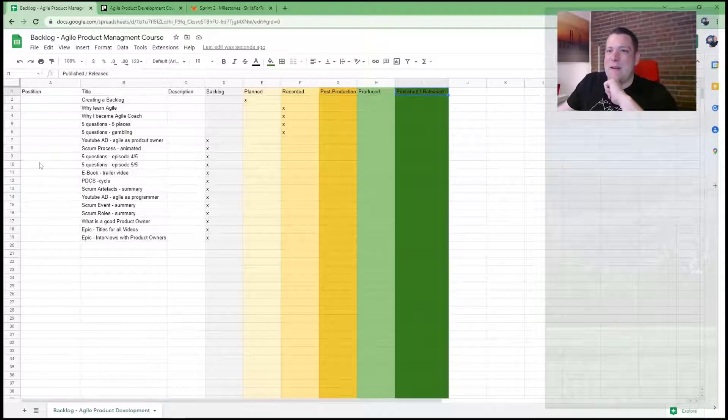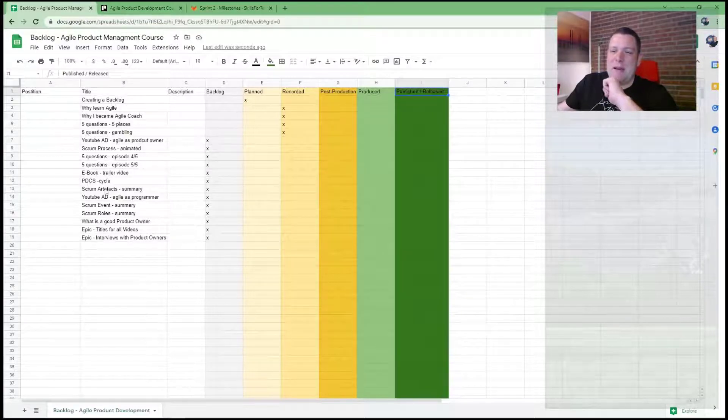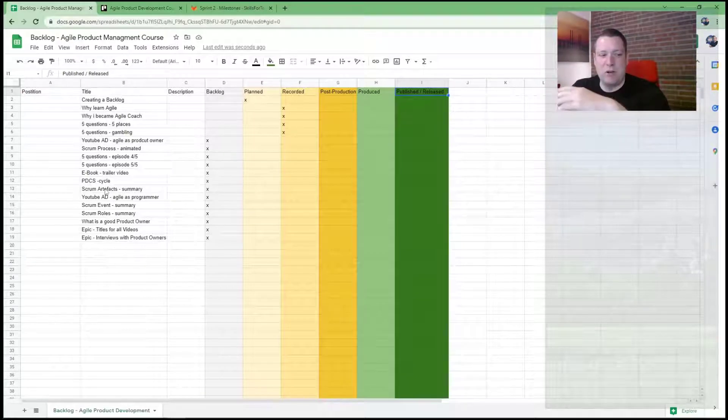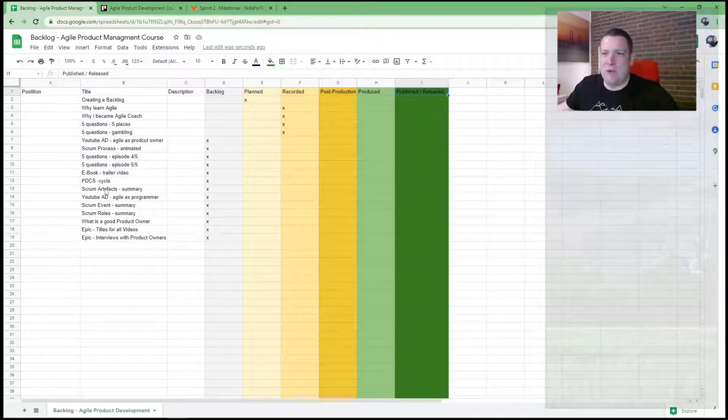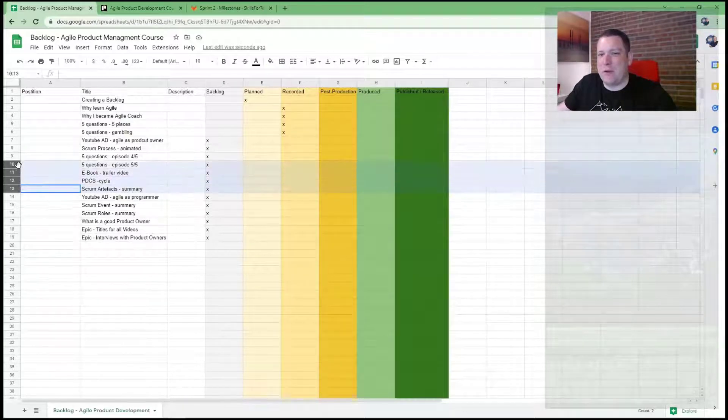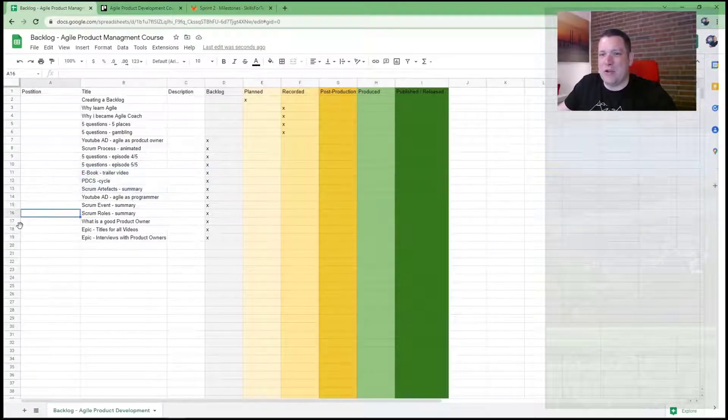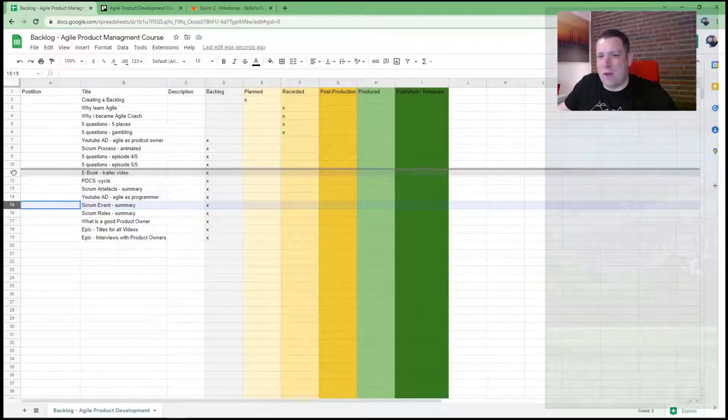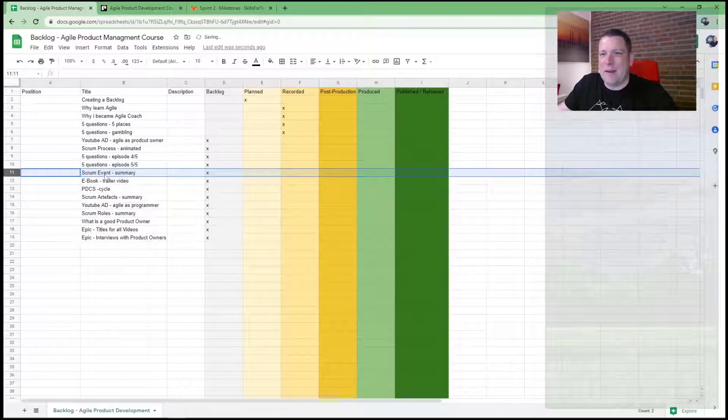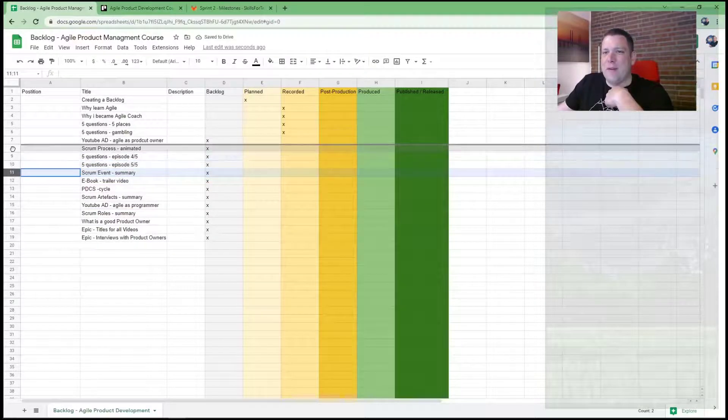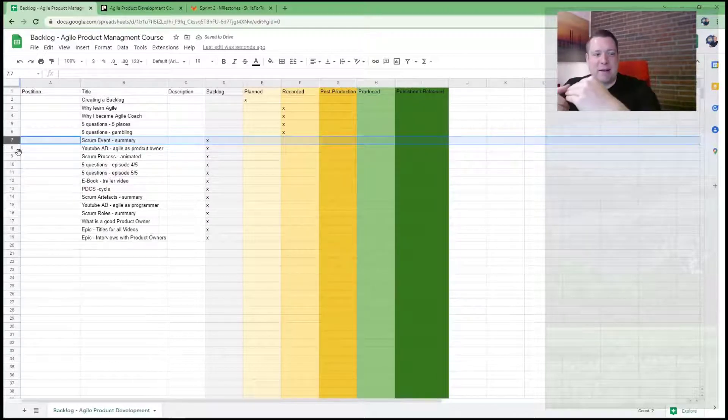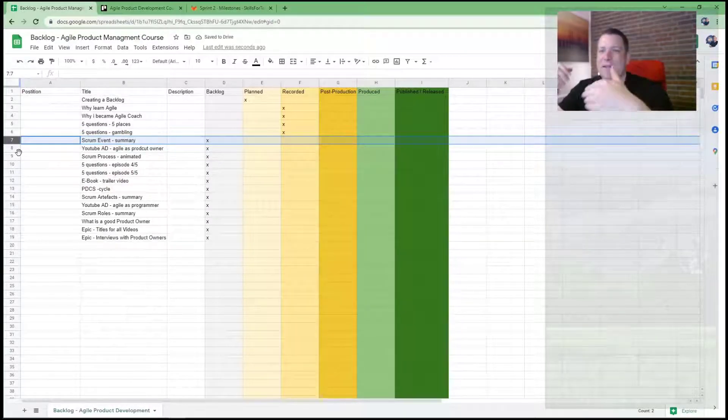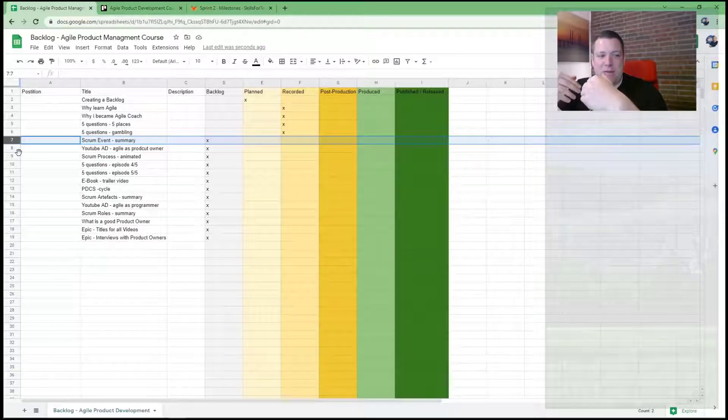One necessary thing as a backlog, it should be accessible to everyone. Now that's Google Sheets. If you are on Google Docs and use it with your team, you can make it accessible. The other one, it should be sortable. And actually you can sort this one like just moving it around. And by that you can prioritize the backlog. That's one main task of the product owner that he has to prioritize the backlog. And he has the final say over it.